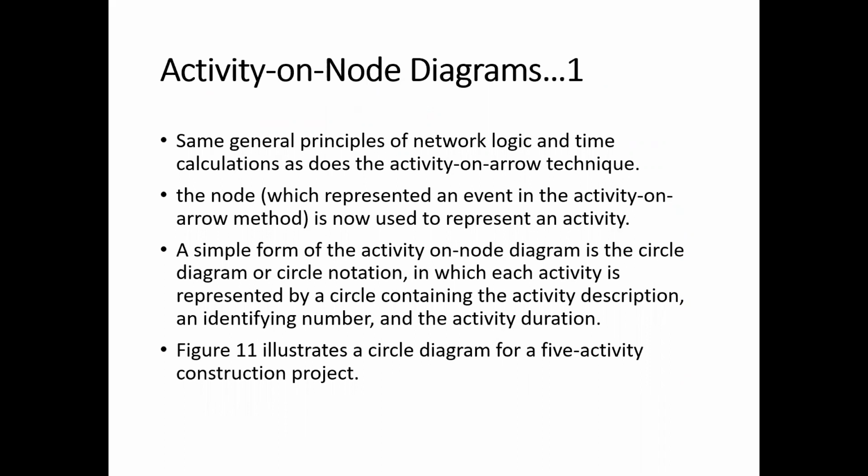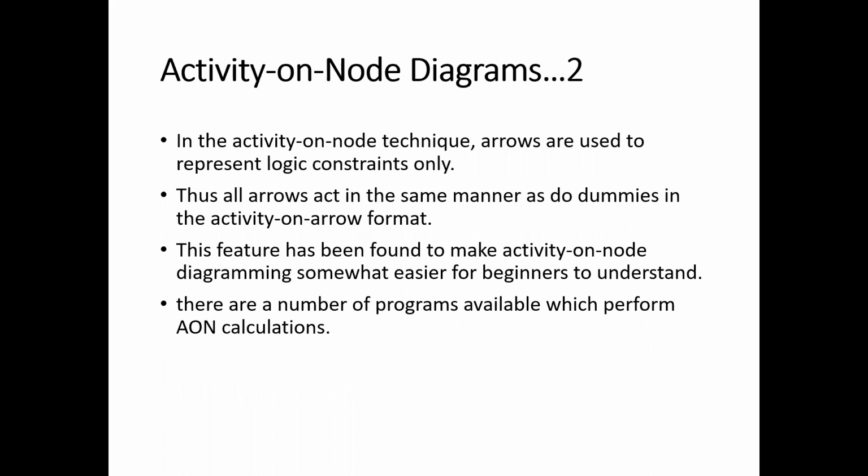In most of the programs, such as Microsoft Project and Primavera P6, activity on node diagramming method is used. And you will find that activity on node diagramming method is much simpler compared with the activity on arrow diagramming method. Although, your effort in learning that is not wasted, because many of the concepts used in the activity on arrow diagramming method are still valid in the activity on node diagram method. So we will now look at the activity on node diagram method, which is much simpler than the activity on arrow diagramming method.